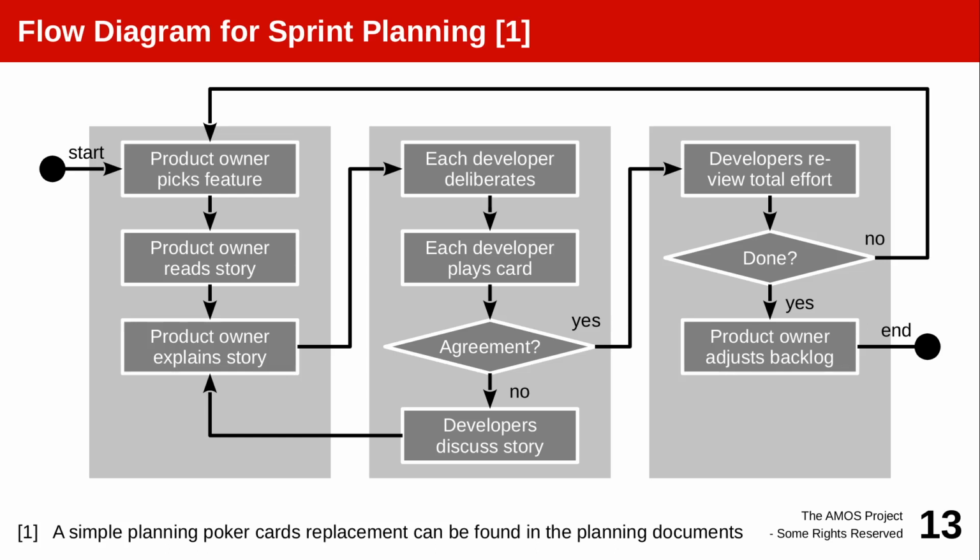And the key thing is you now learned by discussing technical complexity, what is a 5? For your team only, what's a 5? And so in the future, same size features will also be 5s rather than 3s or 8s. And so you do this for one feature, you agree on the size, and then you move on to the next feature. And the product owner asks again, can you do one more feature? And the team says, looks like we still have space.